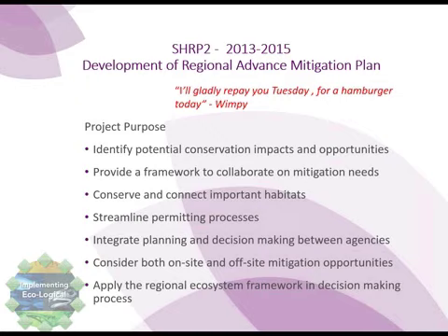The district has projects in the same general area where our recommended transportation mitigation sites were best implemented. There are also a myriad of other potential partner projects from nonprofits and local entities. The idea we had was to group efforts for more efficient and impactful mitigation. The third concept is to conserve and connect important habitats and make sure all the linkages between them are protected. We also worked to streamline the permitting processes by informing everyone, including resource and regulatory agencies, what the impacts across the region are likely to be ahead of time from the many different agencies and projects that are coming.